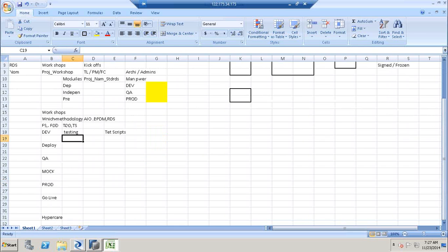Or if not, in the hypercare, we'll give some agreement saying that we will handle some 10 change requests free of cost, and then proceed with so-and-so dollar amount, and again we'll give a condition saying that the required man-hour effort is less than 40 hours for each.